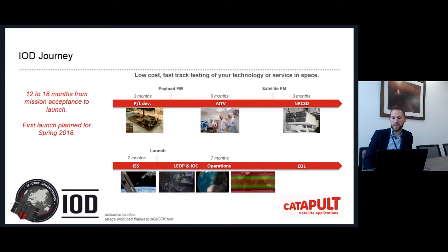There's 3 months where it's delivered to our launch providers, nanoracks. That's ahead of the launch date. That provides time for us to deliver it physically to the integration site, to get it then for nanoracks to integrate with the launch vehicle, for that to be integrated on or delivered to the space station, and then for it to be deployed onto orbit, which is the ISS element on the next line.